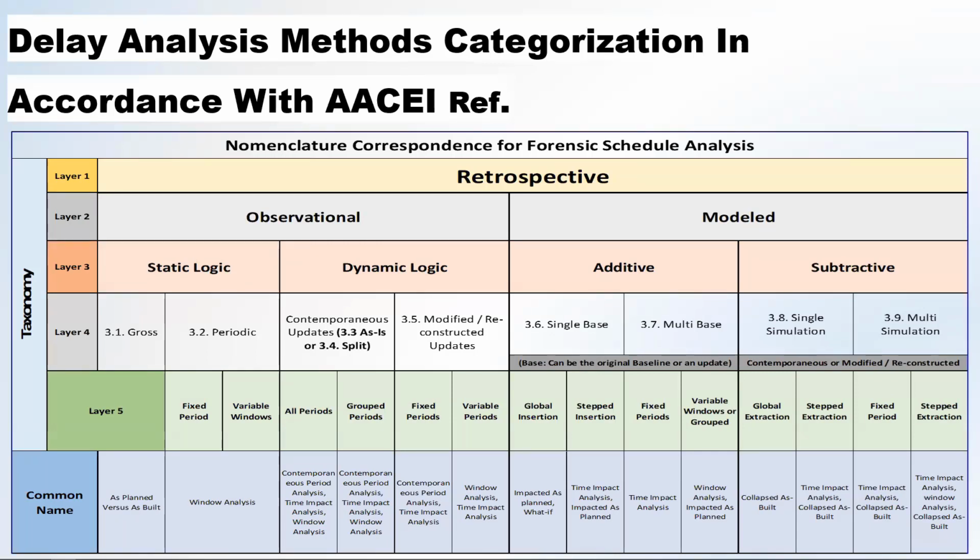If you can do periods that are equal to each other, fixed, or you can vary, or you can do all periods, or you can do just segmentation, small segmentation. So it's just doing some detailed implementation of how you divide the windows inside these method implementation protocol, which is layer 4.